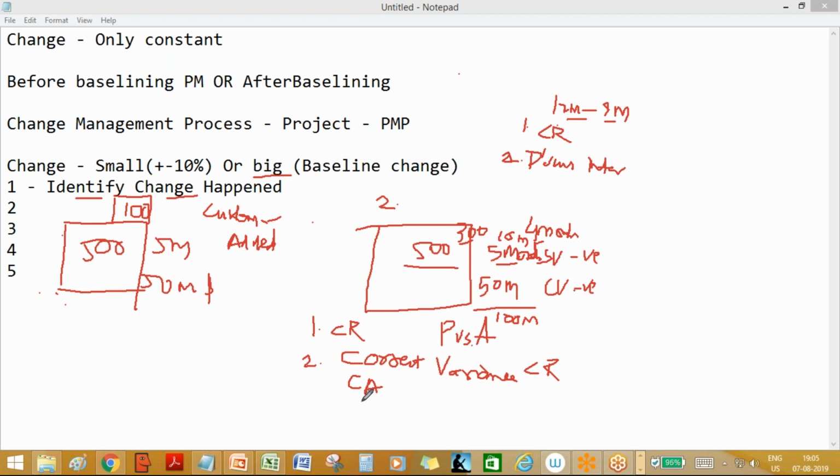Yes. Second situation, PMs. The PM is behind the schedule and over budget. Now he wants to correct it. That's called corrective action, right? He wants to course correct and come back on the plan. If he gets 10 months and 100 million approved, now he's able to achieve the plan, right? So that's why he is raising the corrective action. Second situation, okay? You understood, right?